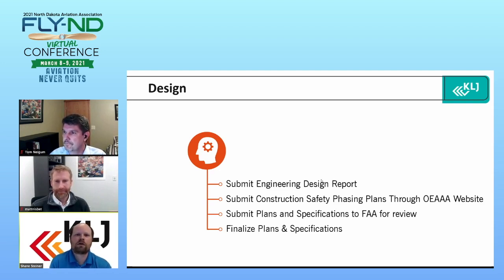Well, now it's more looked at the planning part of the project, where the points of interest are submitted. So then the FAA and the sponsor can see where the haul routes are going to be, where the staging and storage area is going to be, any borrow or waste areas, and are those areas the same thing that are on your environmental documents?